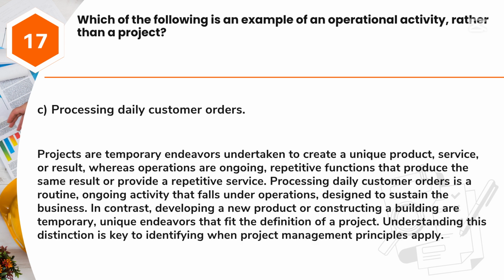Answer: C. Processing daily customer orders. Projects are temporary endeavors undertaken to create a unique product, service, or result, whereas operations are ongoing, repetitive functions that produce the same result or provide a repetitive service. Processing daily customer orders is a routine, ongoing activity that falls under operations, designed to sustain the business. In contrast, developing a new product or constructing a building are temporary, unique endeavors that fit the definition of a project. Understanding this distinction is key to identifying when project management principles apply.